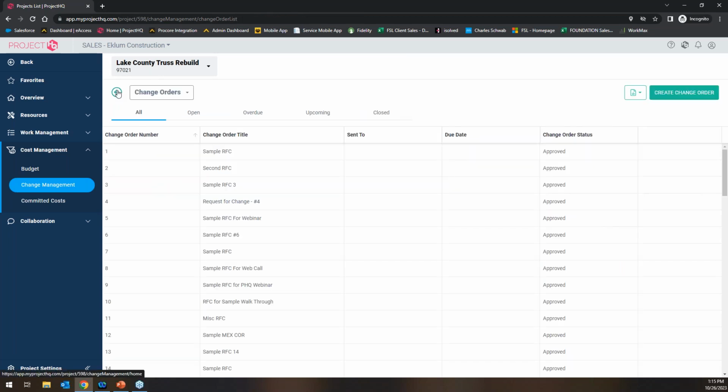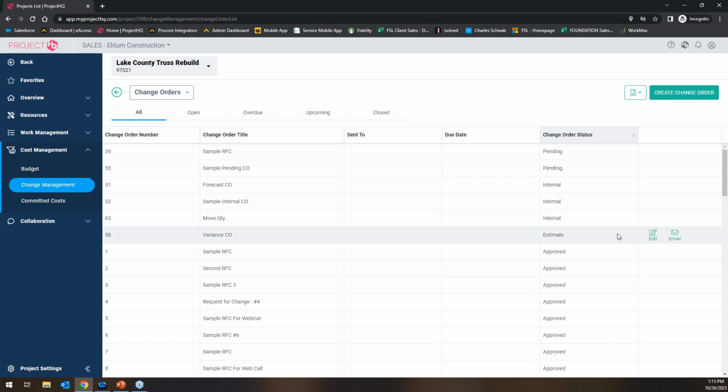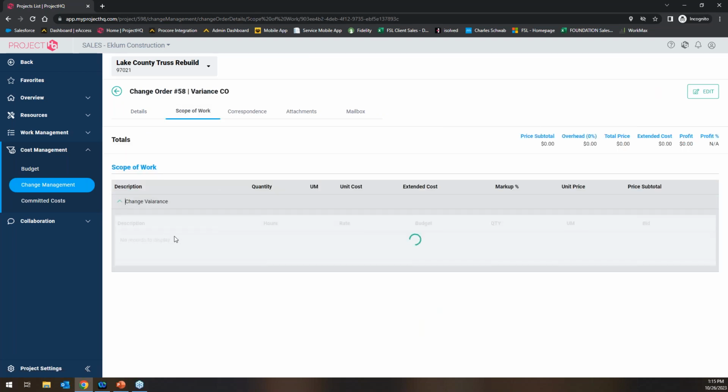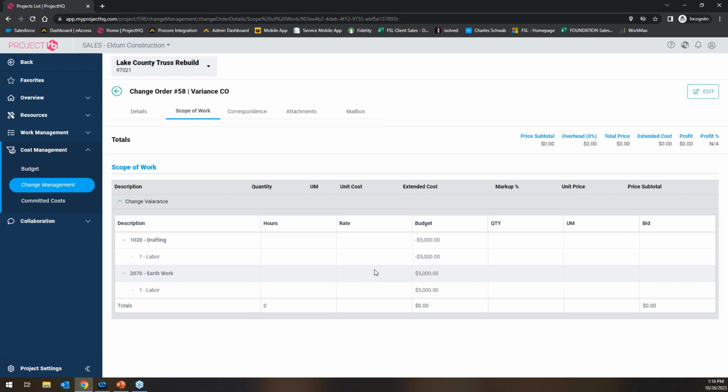And there's going to be probably, I would imagine, times where you might not have a request in a formal request process that turns into an actual change. There might just be a time where you're just going to come over to create a change order. Or what happens a lot of times, I know a lot of our customers will create what are called internal or estimate change orders, which are really just kind of like they sound. It's really just a way to move dollar amounts from one code to the next. I know a lot of companies will have a variance line item or a contingency line item they can pull dollar amounts from to kind of adjust the dollars.